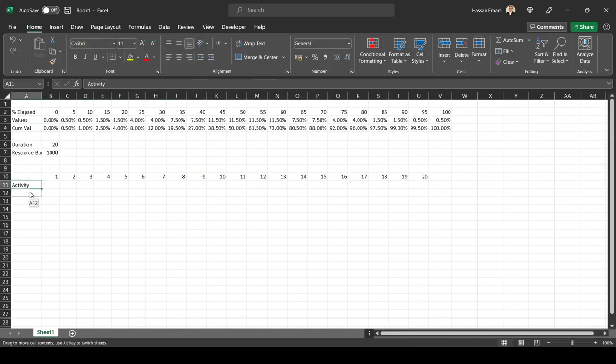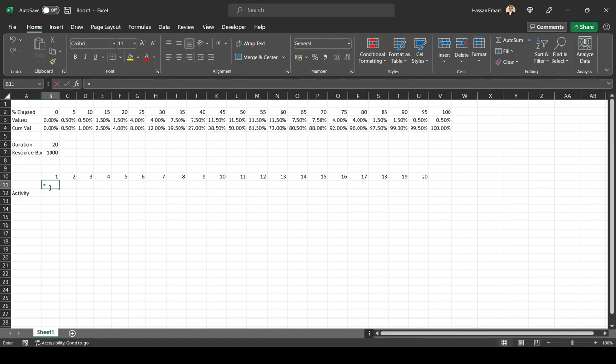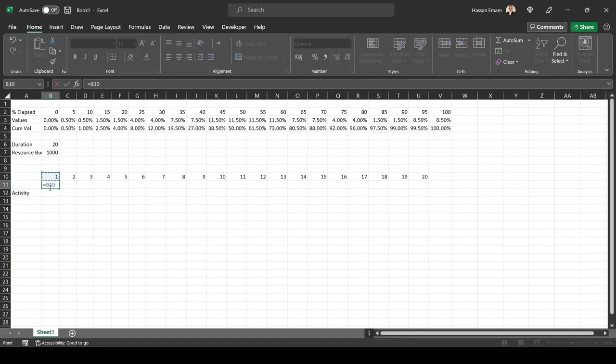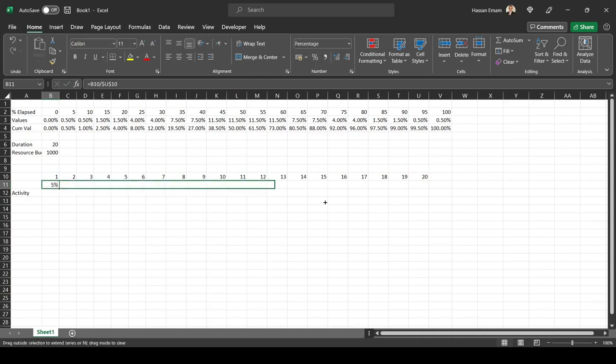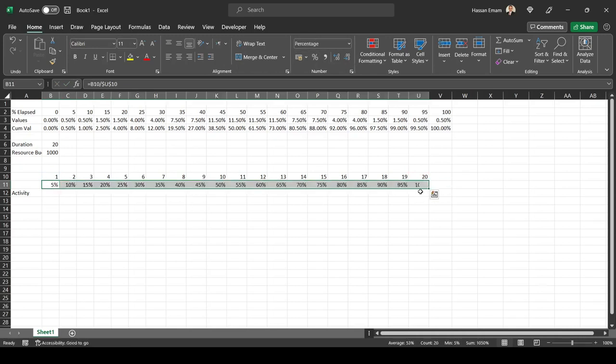Before we do any calculations, what I want to know is what is the time elapsed or the percentage of time elapsed, which will be equal to the one divided by the 20, and that happens to be five percent. Then we keep doing that for all until we reach 100 percent.